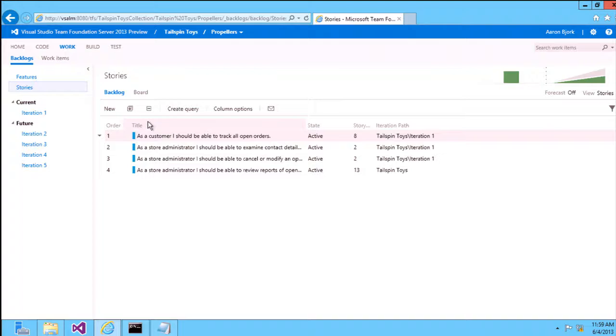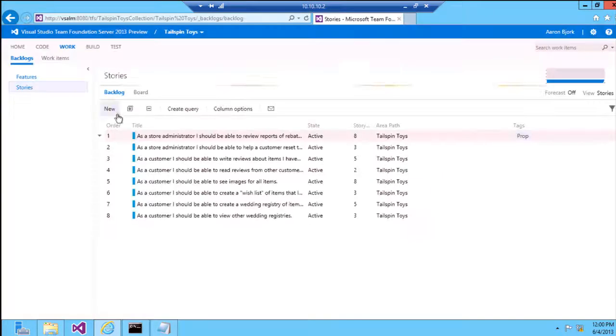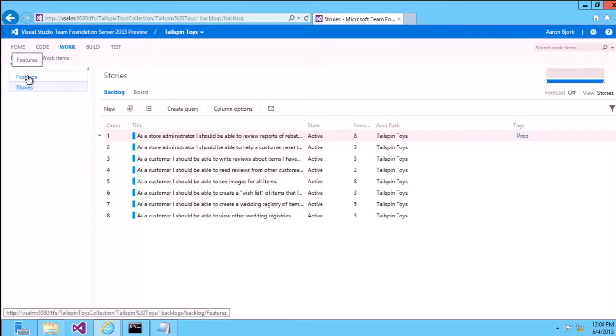They've got like 6 scrum teams. I think you've got about 60 people in the room. And they have a grooming meeting on Mondays. I think they do this every other Monday because they're on 2-week sprints. And what they do is the product owners come in and talk about items on this higher level backlog. So they might be talking about features and stories in context. And then teams will actually sign up in that sprint to take on some of those stories.